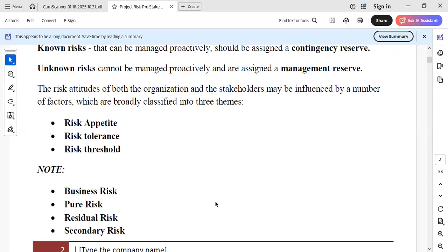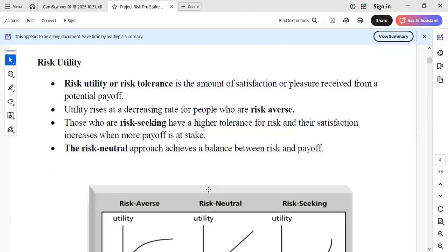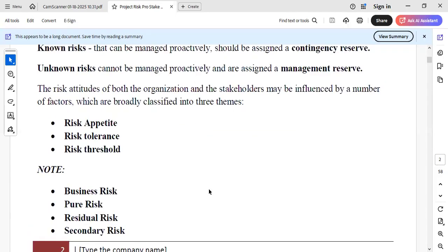When we carry out risk activities on the project, maybe you could have identified some risk right from the onset, and we come up with response strategies and try to implement them. We may achieve them all, but there may be some other risks we cannot eliminate. They will just be there. Those ones, we will come to live with them by accepting them. We may only come up with some mitigative strategy to mitigate them if they occur.